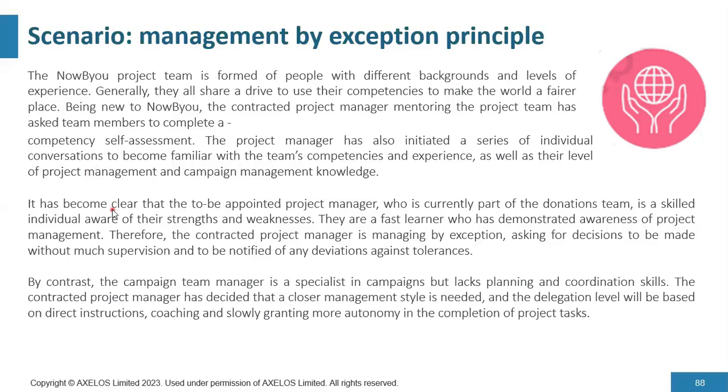It's become clear that the to-be appointed project manager, who is currently part of the donations team, is a skilled individual aware of their strengths and weaknesses. They are a fast learner who has demonstrated awareness of project management. Therefore, the contracted project manager is managing by exception, asking for decisions to be made without much supervision and to be notified of any deviations against tolerances.